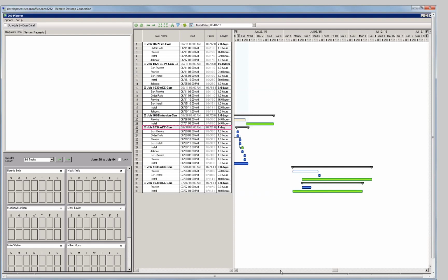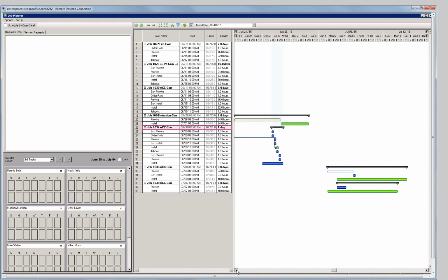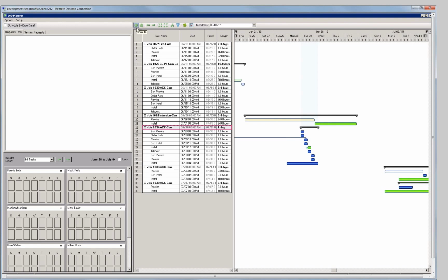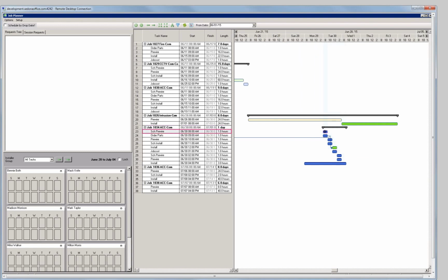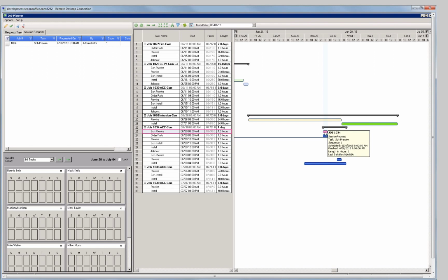So in using this function, you can look at this being done either by a one-man shop or maybe a multi-man shop. If I'm a project manager, but I'm not the guy who's actually scheduling, what I might be able to do is come in here and say, well, I'm managing this job and I need people. So I can come in here and do what we call a request. Right click on it and request for task. And this is one of the steps in the scheduling process. And just to show you how this works, what I did is I just requested this task, and it placed this task into my current session.